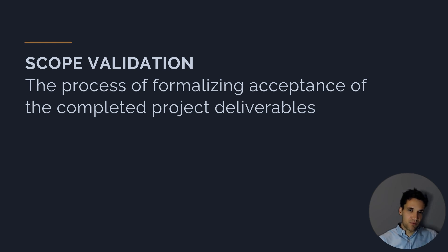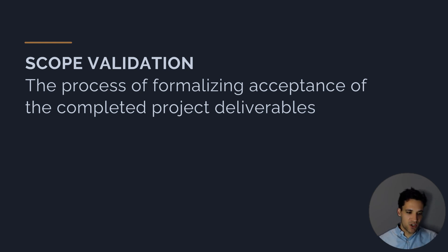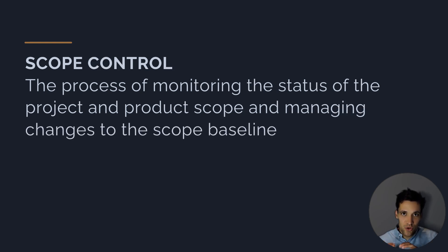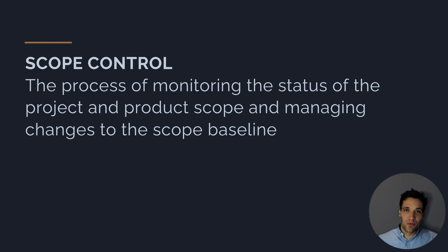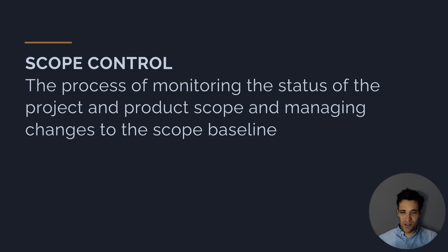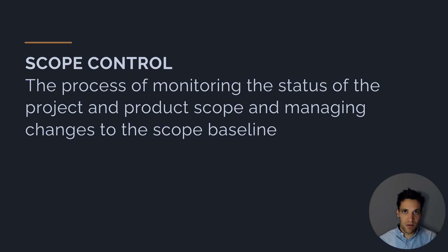All of that happens in the planning phase. After we've defined scope and created our scope baseline, we move into project execution. During execution, while we deliver the project scope, we also need to validate it — scope validation is the process of formalizing acceptance of the completed project deliverables, checking what we've done matches our original requirements. We also need to control project scope — ensuring we're not doing extra work beyond what we said we were going to do, and managing changes to the scope baseline through a formal change management process.